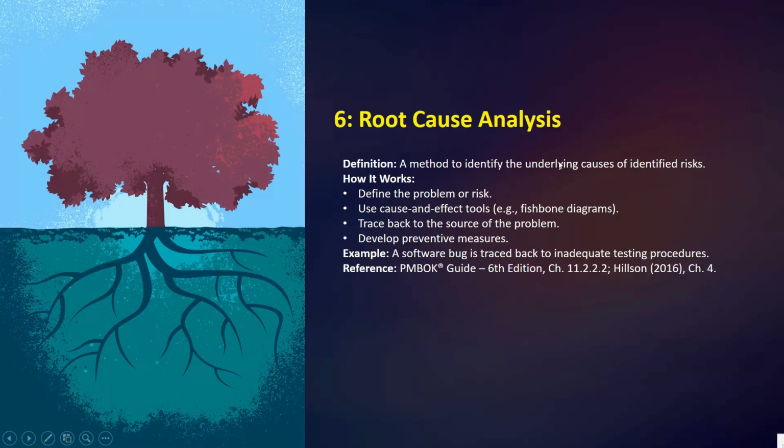Define the problem or risk, and then use cause and effect tools, for example, a fishbone diagram. Then trace back to the source of the problem. Then develop preventive measures.